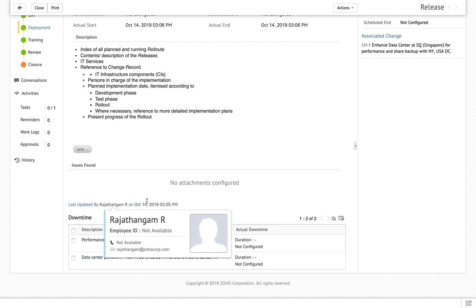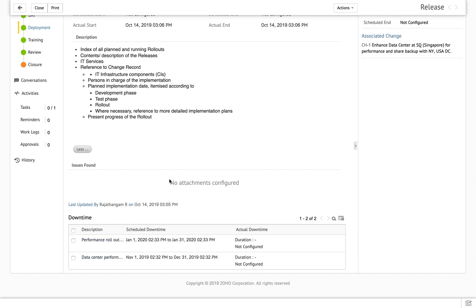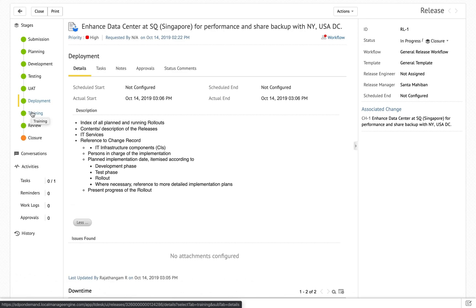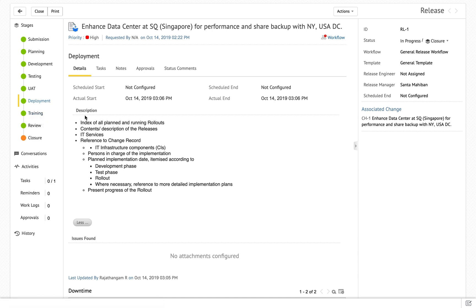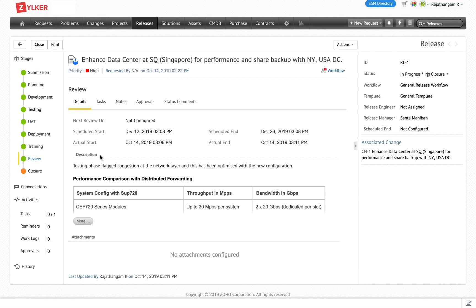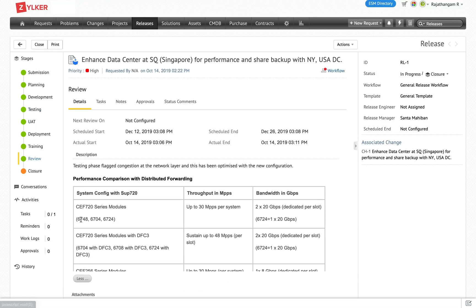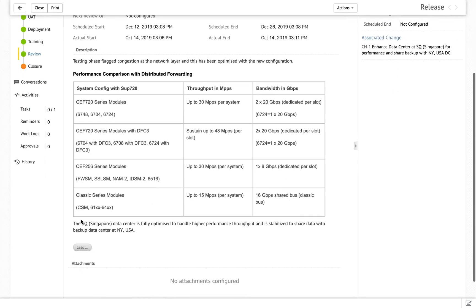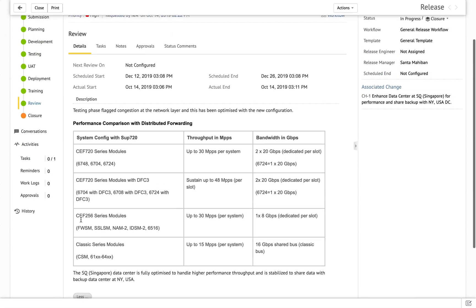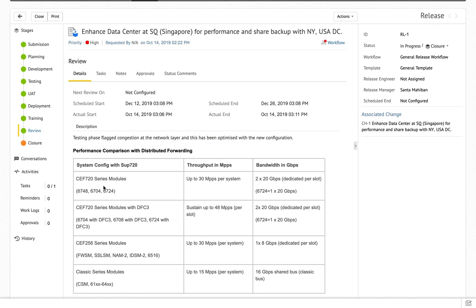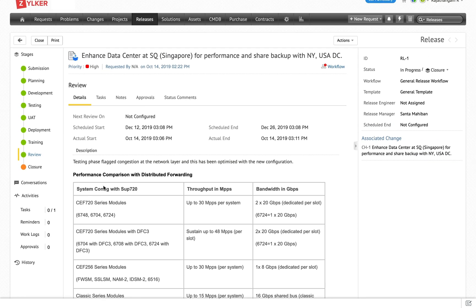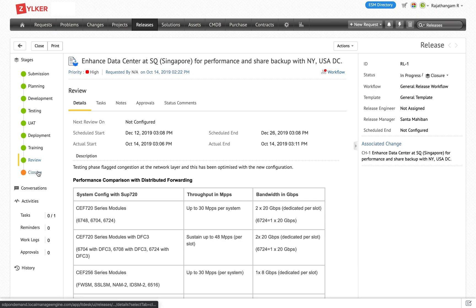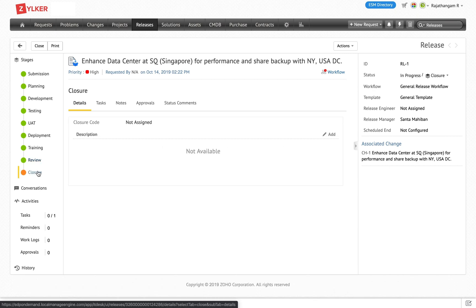If the release is about software enhancement or development, you can have training for users. Our specific release is about a major data center upgrade, so we are skipping training and moving to review. All deviations that happen from planning through completion are documented in the review. The proposed architecture has been enhanced and is now scalable for performance and load testing. Once the review is completed, you can close this particular release.